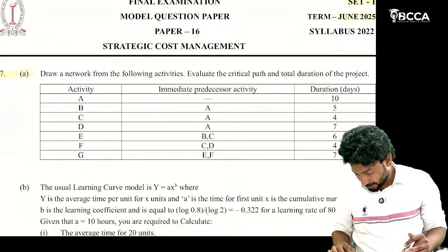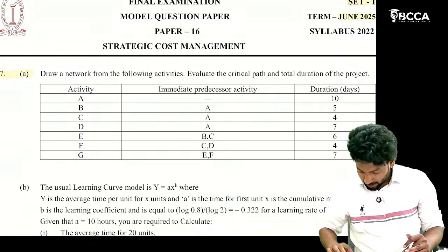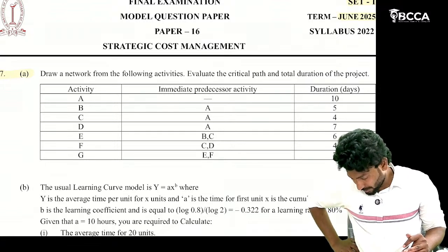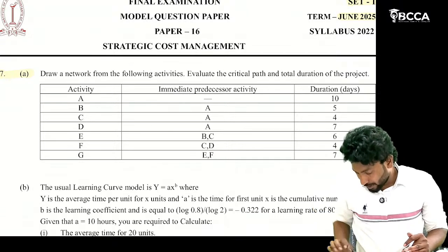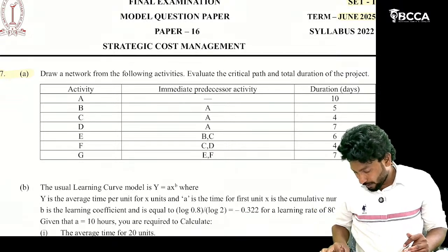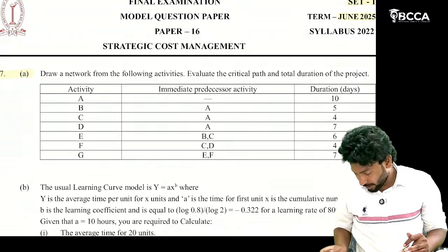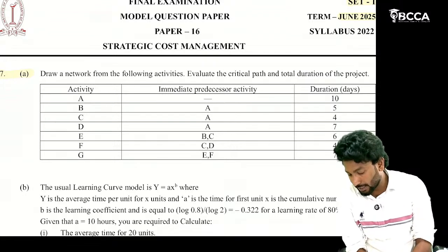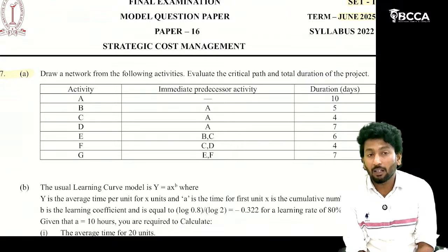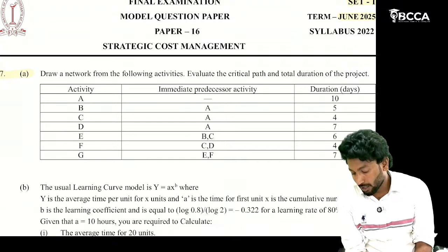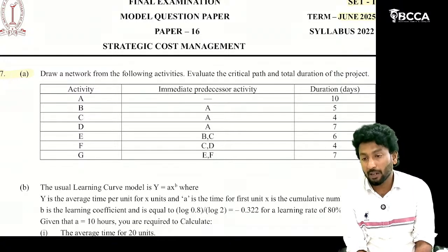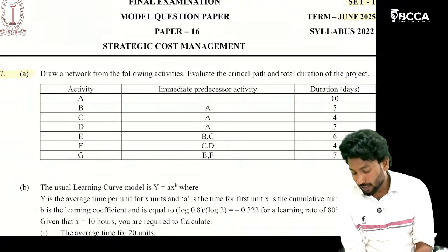Prashant, nice. Ramakrishna, you have taken from B to C. Again, in between two lines you have written B, C, D. B, C, D are activities, not events. That is wrong. And from C you have taken one line; that should be a dummy line. If you take those lines as dummy, it would be correct.